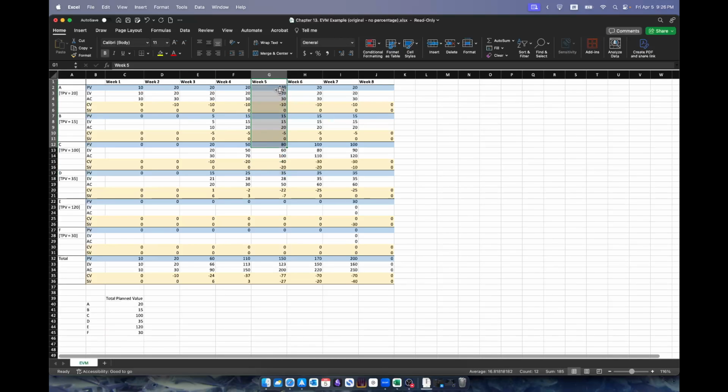Okay, week 5. Obviously, we have reviewed subtask A and subtask B. Subtask B total planned value is $15. It looks like your original schedule plan is to complete this by the end of week 4. Therefore, 100% of 15 is 15, so it will stay throughout the project planning period. And the earned value, it looks like you also completed 100%, so your schedule variance is 0. But you also overspent by 5, so your actual cost is 20.